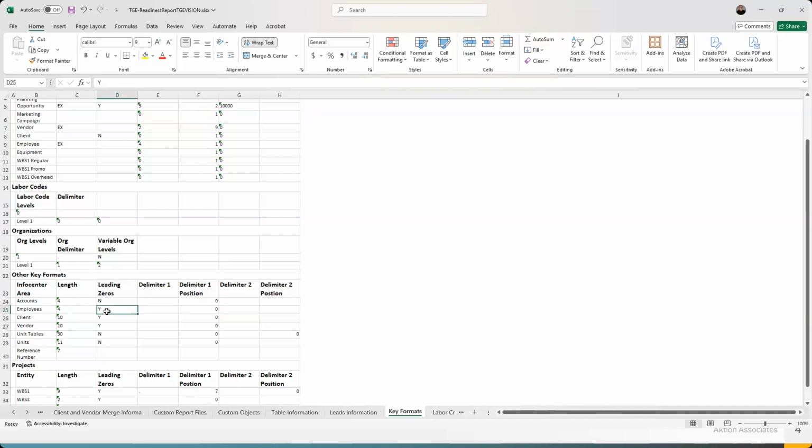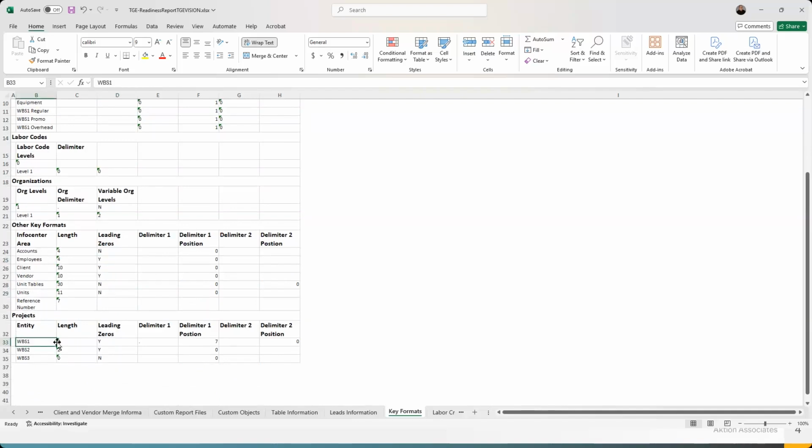the database, right? So project number, so WBS. I always point this out just because you hear it a bunch of different ways. WBS means work breakdown structure, which out of the box from Deltek is project, phase, and task. But I've got lots of clients that change that up and call it project, task, and subtask. I've got project, billing group, and subgroups, right? So as you can customize the database too, Vision and Vantagepoint, what you want to call something, you handle with that within the labels. But this is just documenting everything numbering schema-wise in your database.